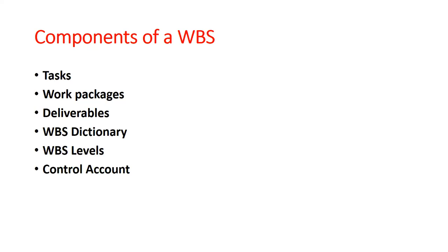So if you have 1, we could say this is level 1. If you go further to having 1.1, that means we're having level 2 of that. If we go say 1.1.1, we are breaking it down into much more levels. But that could be on what we call serial number, but ordinarily we call it codes of accounts. Okay, codes of account.